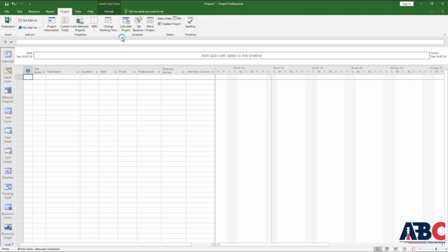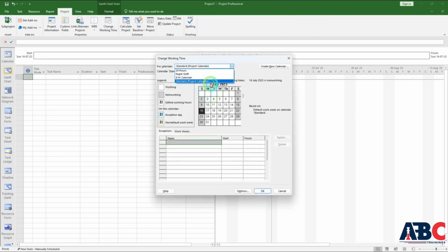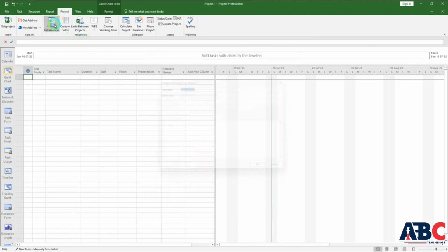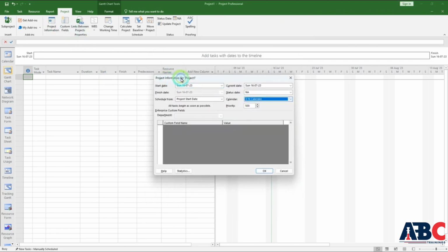So first of all, we create a new project. For that, I take the task calendar and we have to assign that project to that calendar. And here you can define the start date too. Consider it as 28. So I have assigned it and I am giving the start date and applying it. So the start date is applied here.